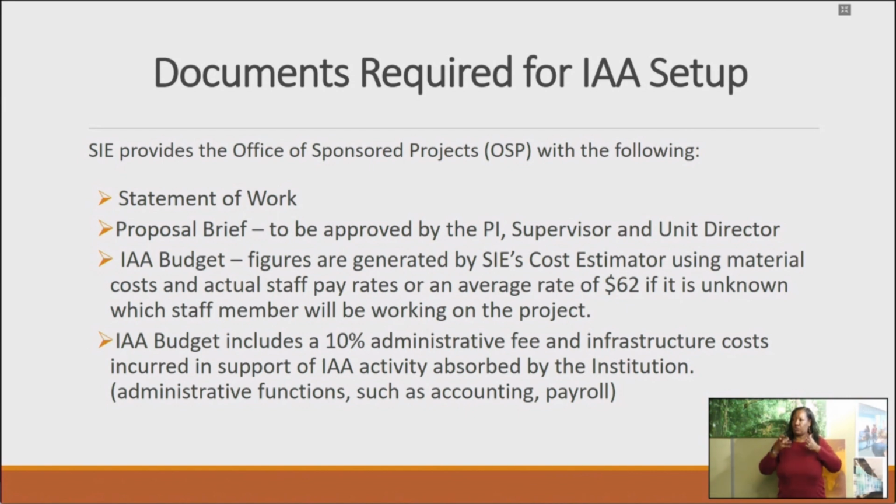We have to submit an IAA budget to the Office of Sponsored Projects. Again, these figures are generated by our SIE cost estimator using material cost. When we have small IAA agreements, we typically know who is going to work on them in our production shop, our graphic shop, or our design shop. That makes it really good because we can tighten the budget. We know what their actual salaries and benefits are, and we fit that right into the IAA budget.